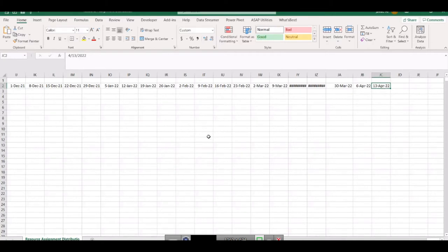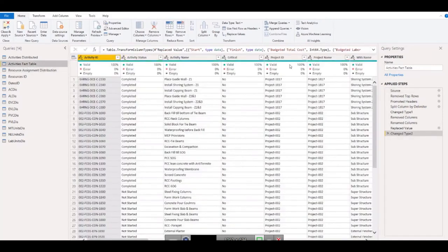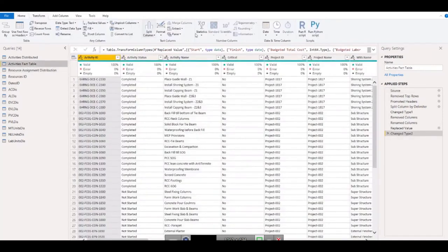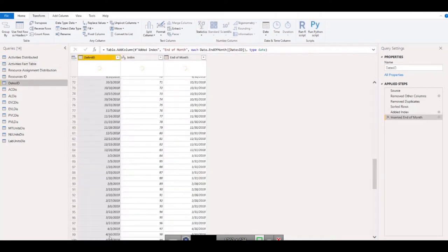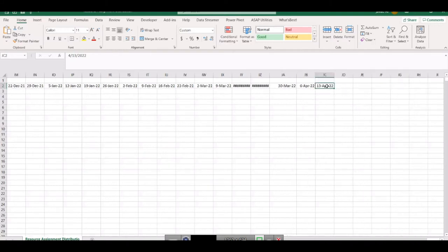So this is the first checkpoint. Whenever you find something irregular in Power BI, come to Power Query and check that. For example, I have tested the budgeted column, budgeted total cost, from this statistic; go into transform and check statistic. So I was sure that the budgeted total cost is the same, that means the data is here. Then I checked this and I found that the last date is not correct. Why? Because I checked it from P6. Then I went into the Excel sheet and checked how the data was exported from P6, whether it is correct or not. That means the data source is fine.